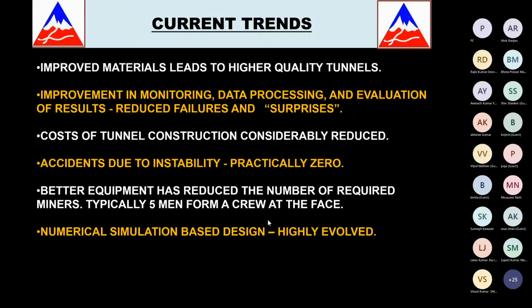Now, today, what can happen is if we keep continuously monitoring, then even if there is a fault line or fault coming ahead of our face, our targets, those 3D deformation targets, will start showing some kind of deformation because there is a softer strata ahead. And with that, we can predict that we need to improve or increase our supports. And then there are lesser chances of failures and surprises.